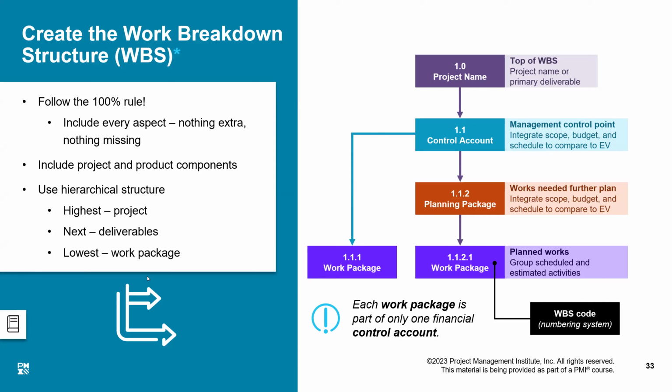On a very similar mechanism, a work breakdown structure starts with the name of the project, and then it is divided into control accounts or phases, and then further divided into various work packages, which could have even layers under them. Maybe we could have a work package and then a sub-work package. But I would generally say the work package is the lowest level of a WBS. Although a work package can further be broken down into activities or tasks, this is one package of work, and from the point of view of the project manager, it is the level he's concerned about.